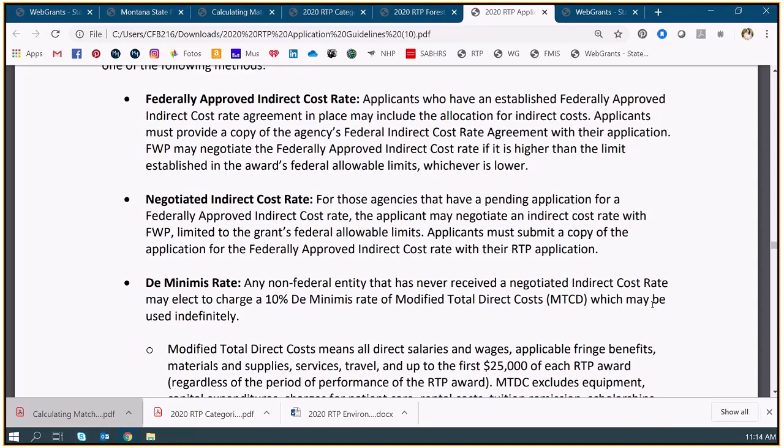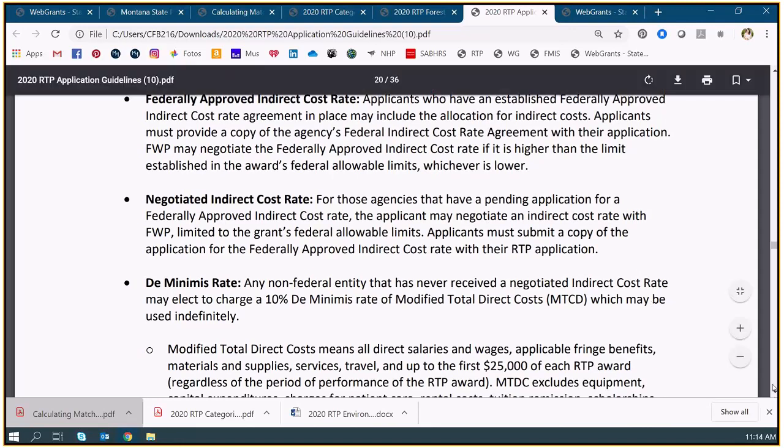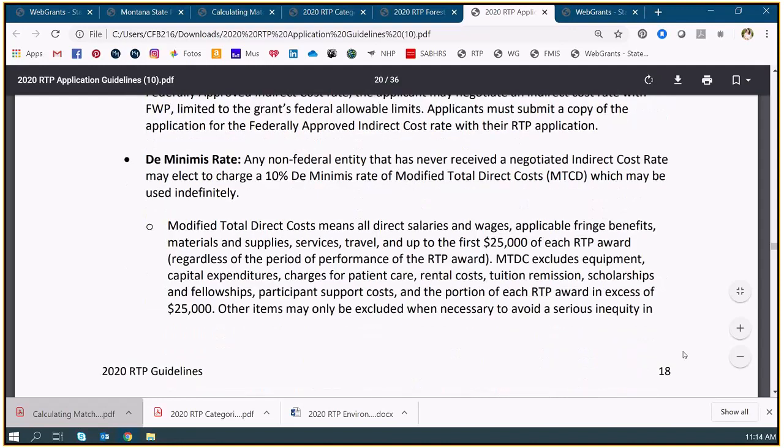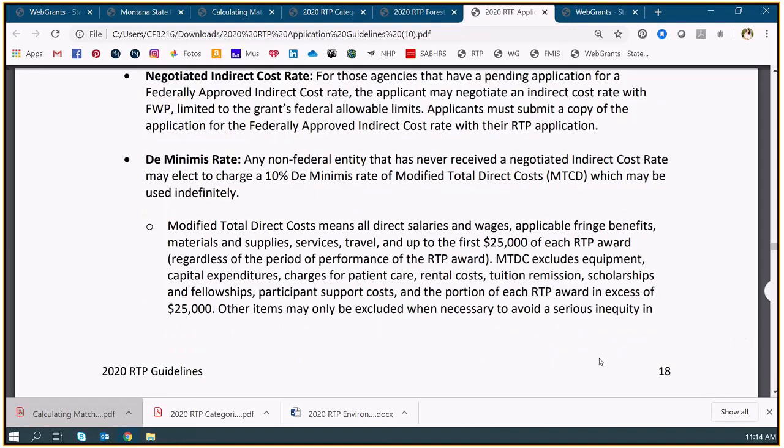First of all, we need to work with you to establish exactly what is covered under that indirect cost rate, what you're going to use, and then it needs to be used consistently in all of your federal awards from that point forward. So if you're working with us over several years, or using any other federal program, you're going to have to use that same indirect cost rate in that same way. So that's where I say it gets complicated real quick.